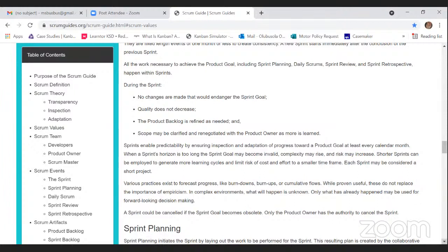So we decided that this pen is not going to have a cover, and maybe we've been working on the cover for about a week, and the sprint is about 2 weeks. But new changes have been made. We've said that the pen will no longer have this cover, it will have an automatic cover, or maybe it will just go in and you won't need to separate the cover from the pen. So we decided we are ending the sprint, we're canceling the sprint because we're no longer producing covers. The pen is no longer going to need a cover. Basically, that's what it means.